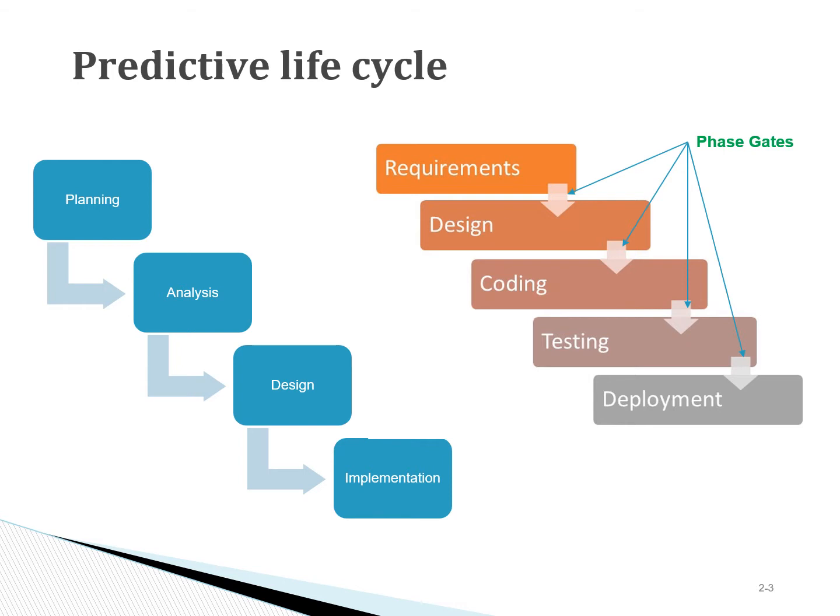So, for example, if we look at the first phase gate, at this point we are looking at the requirements, and we are looking at everything that is developed, and we're making the decision: are these adequate, are these sufficient to move forward, or do we need to go back and redo some of these? Or maybe based on the requirements and the cost estimates associated with those, we decide that we don't want to do the project.